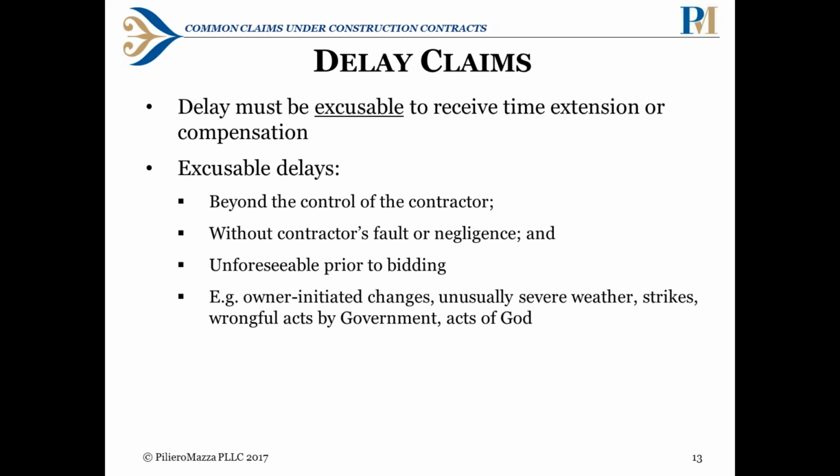And we received one question about whether you need a time impact analysis as part of an REA or a claim. And we do often encourage the time impact analysis. Sometimes if you have a good in-house scheduler, they can prepare them. We've also worked with experts to help prepare them, and they can add some credibility and make it less of a he said, she said, and add another voice in support of your claim.